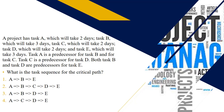Based on the four options, what is the task sequence for the critical path? I highly recommend you use your dry erase sheet at the exam center to write this out. The correct choice is the fourth option — A to C to D to E. Task A takes two days, task C takes two days, task D takes two days, and task E takes three days. You total those up and come up with nine days as the critical path.